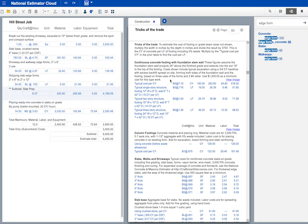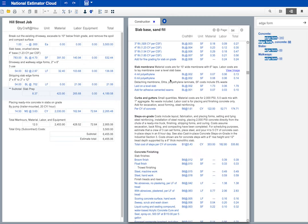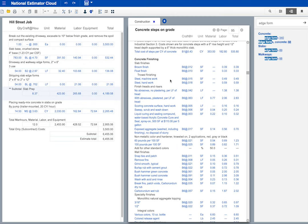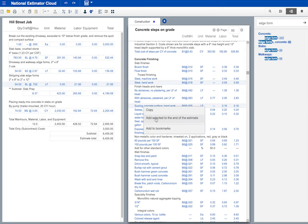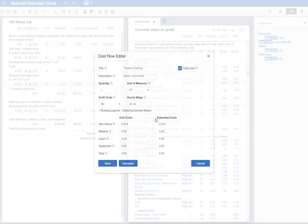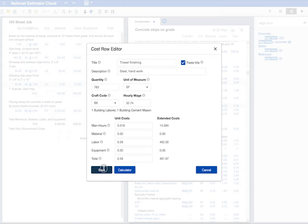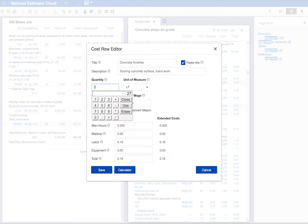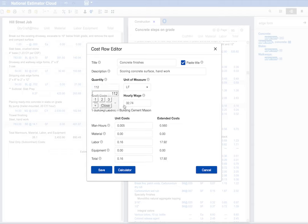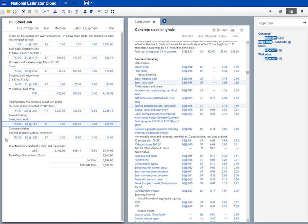Now let's add the cost of slab finishing. This slab gets a steel trowel finish. And then we're going to score the surface by hand. I'll hold the control key down and click the second line. Now let's add these to the estimate. These costs can go at the end of the estimate. We know the slab surface is 783 square feet. I'll press tab to be sure it's right. Looks okay. So I'll save this to the estimate. We'll score this slab the 27 foot length twice and the 29 foot width twice. I'll press tab to check the scoring cost. That's about right. I'll save these costs to the estimate.